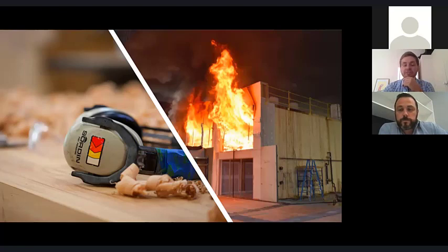Yeah, I'll just add, I guess advice for fire would just be that from an architectural perspective, initially, don't be too ambitious with everything that you want to expose, and make sure that you get all parties involved. Get in touch with your authorities and your potential suppliers, and make sure they have all the adequate testing and all of those things in order before you really get things underway, because otherwise you're going to have a lot of headaches and some costly things arrive on the track.